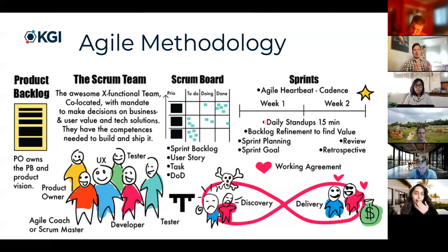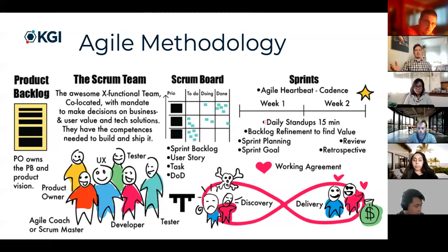How many products am I getting out there to customers, and how much am I finding out when I do that? The way that we keep an eye on the sprints is through these daily stand-ups. The daily stand-ups are a way for us to review, okay, where are we within our sprint? How are we doing? What are we going to get out? What have we learned? Do we need to make adjustments?